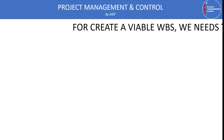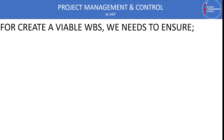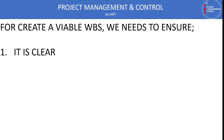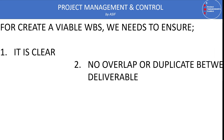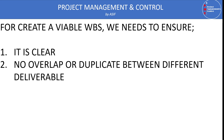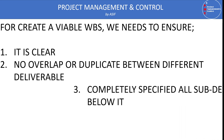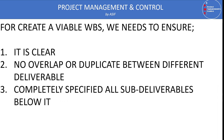For creating a viable WBS, we need to ensure that all components or levels of the WBS are clear. There should be no ambiguity, and we have to make sure that there is no overlap or duplication between different deliverables. We have to make sure that each deliverable completely specifies all sub-deliverables below it.